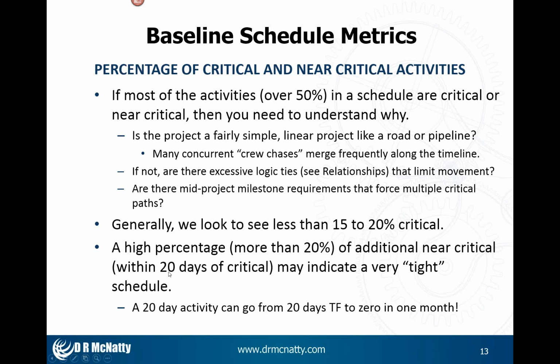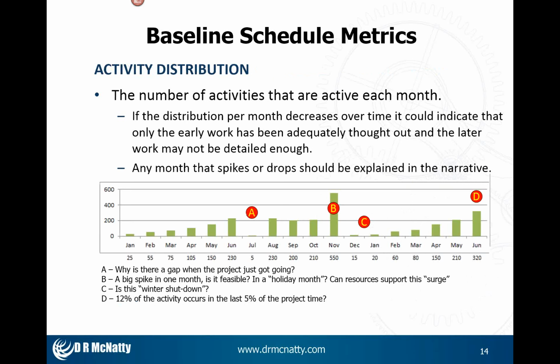Talking about days, an activity that is 20 days duration could go from 20 days of float to 0 float in 1 month if it doesn't start. So even something that's 4 weeks away from being critical can bite you within a very short period of time if you're not paying attention to it.